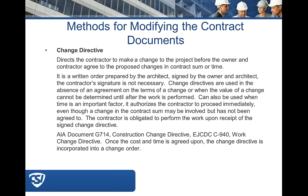Kevin adds that a change directive essentially serves as a promissory note to the contractor. When the contractor countersigns the AIA G714, it can be used for modifying the contract price per the A201, whereas the EJCDC C940 cannot be used for changing the contract price or contract time. Kevin uses EJCDC documents in his work, and his input on the differences between document sets is appreciated.